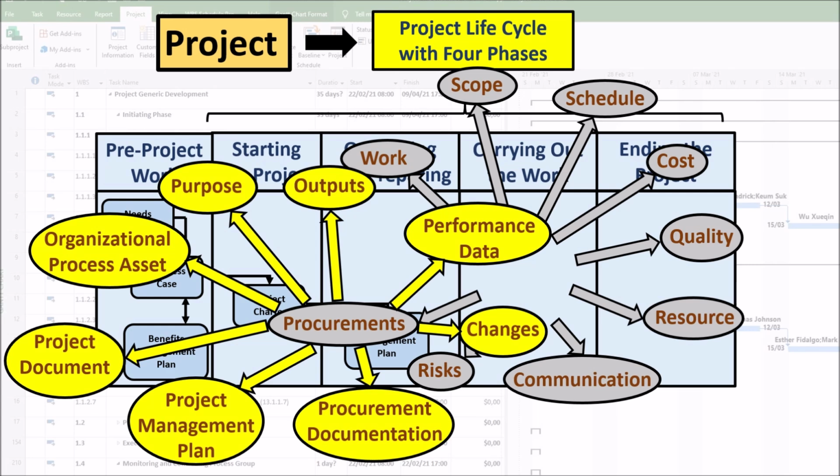4. Lessons learned repository. Lessons learned should be used to improve procurement processes for future projects. At the end of a contract, the actual procurement results are compared to what was defined in the original procurement management plan. This will result in a record of the project objectives that were met and also of the reasons that prevented other objectives from being met. 5. Procurement archive. A complete set of indexed contract documentation, including the awarded contract, is prepared for inclusion in the final project files.